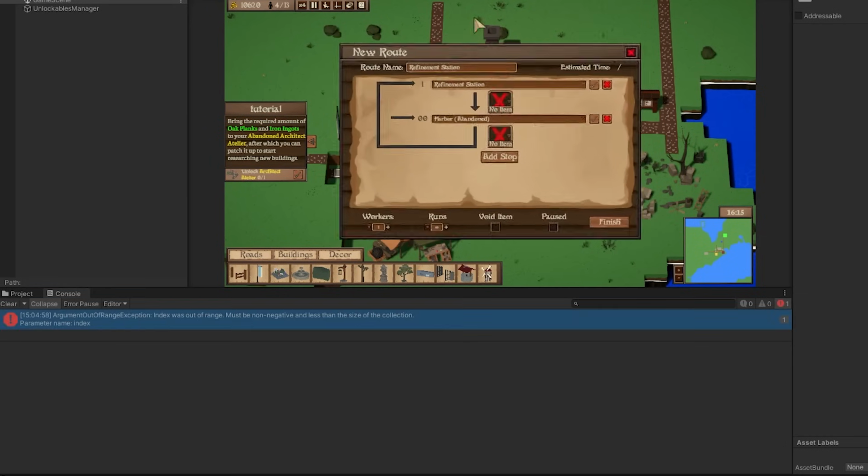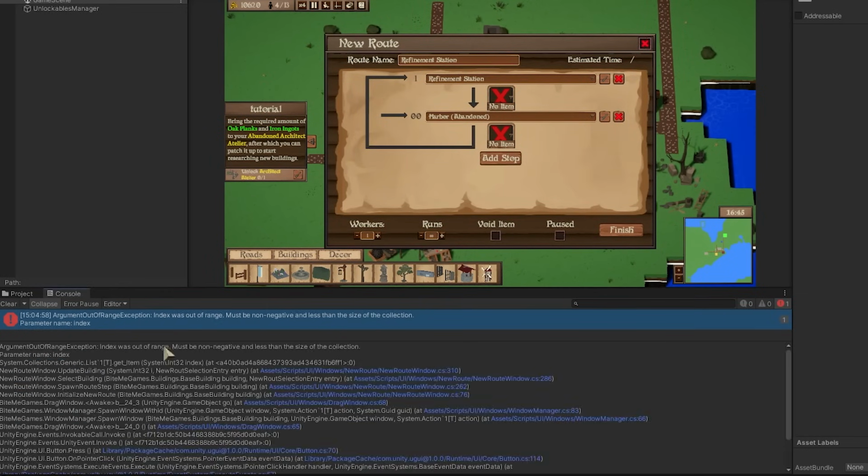If you're planning on adding a cool new feature to your game, but then you look at that planning and you see that you're already 3 months behind on that original idea, you're probably not going to be as incentivized to just add it right away, because you see that, hey, actually, I have more important stuff to do right now. If it's all in your head and you're just at runtime deciding whatever feature you're going to implement, that's a recipe to get scope creep disaster, because you're gonna keep tacking things on and never going to take a moment to step back and be like, okay, have I actually finished some of the things that I have to have in my game already?